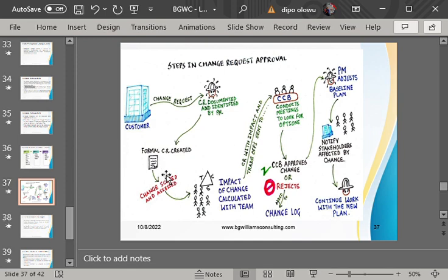What follows after it has been documented, take note, this is our exam question. In this area you have like 5 to 10 questions from the exam. What would the project manager do when it has been documented? Next, the project manager will what? Assess. Now, this change request that they sent is what? Change of scope. What would the project manager do after it has documented the change request? Is to assess and find out the impact.